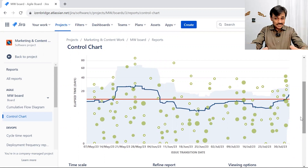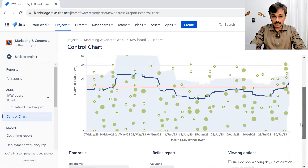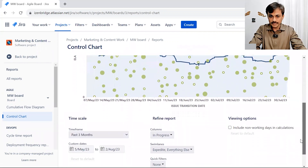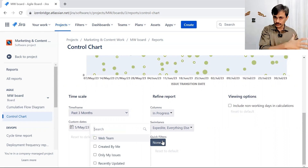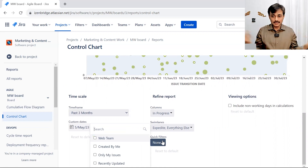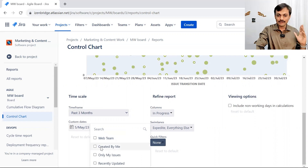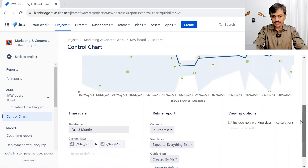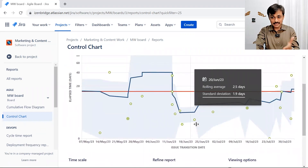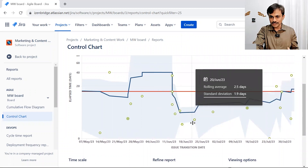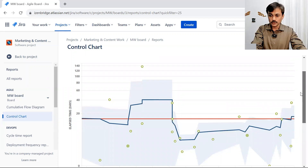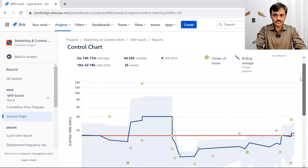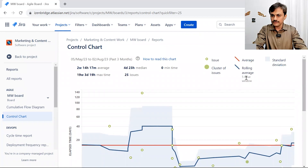The data looks a little cluttered. Sometimes your project may have a lot of information and you need to segment or categorize it. You can use the quick filters you have created for your board — all board filters will appear here. Since I work as a product owner, I focus on issues created by me. With that filter applied, the graph becomes cleaner, the standard deviation is narrowing down gradually. The rolling average went down but is going up again over the last few days, meaning issues are on average taking more time. We are using a five-issue window, with 25 total issues.